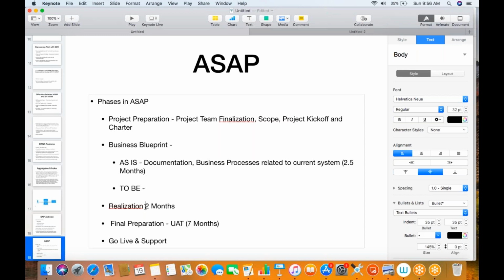So there will be different workshops that you need to conduct. These workshops are called fit gap analysis workshops. Okay, so in these fit gap analysis workshops, you will be showing end-to-end scenarios to the customer. Now again, you will ask a question, how can I show the scenarios? Before I show the scenarios, I need to do a lot of configurations in the system. I need to set it up so that nothing goes wrong in front of the customer, right? That is again a big task.